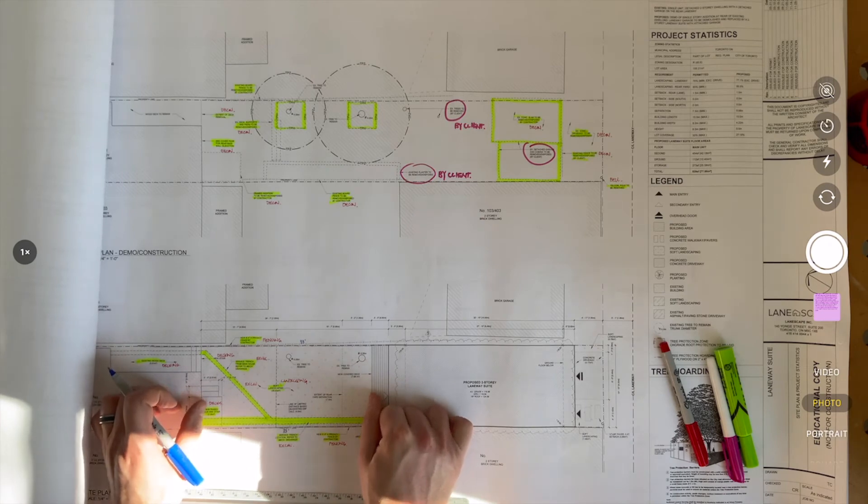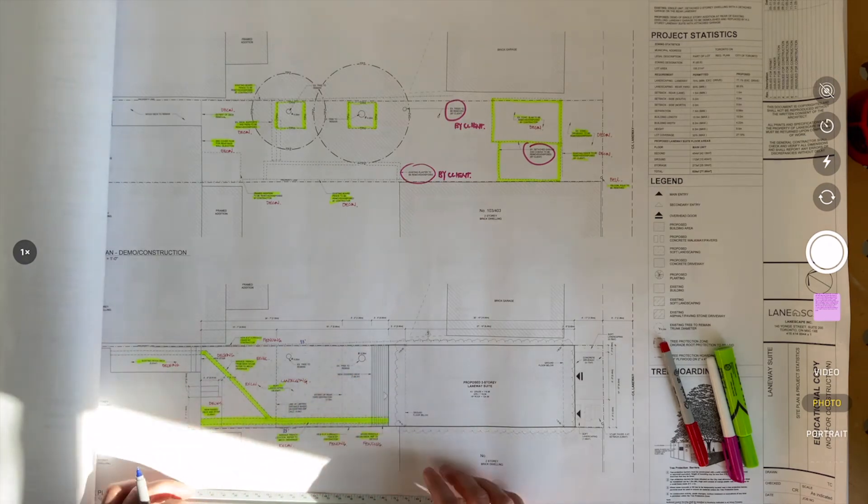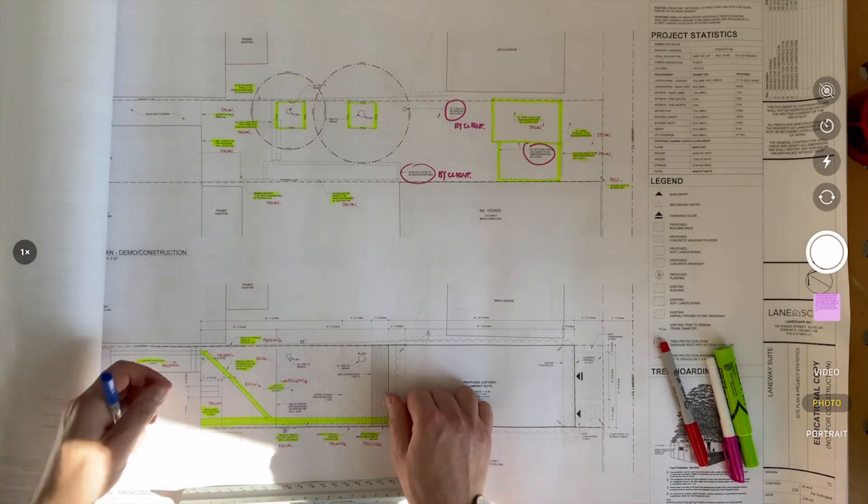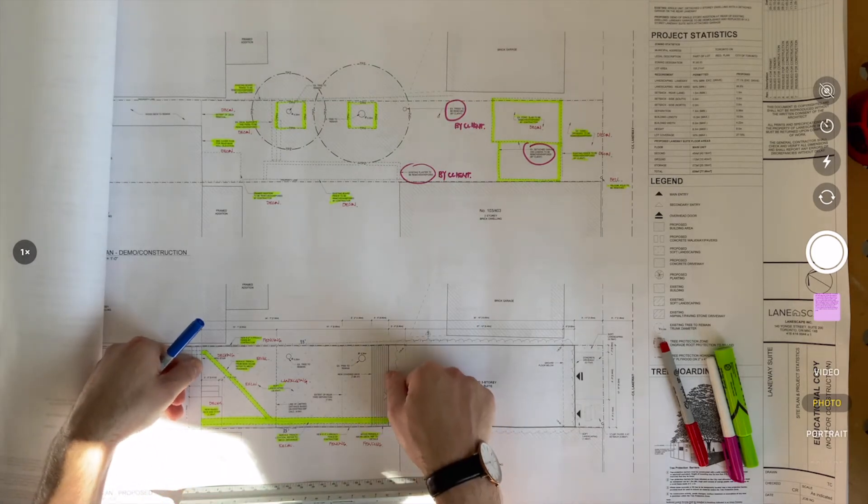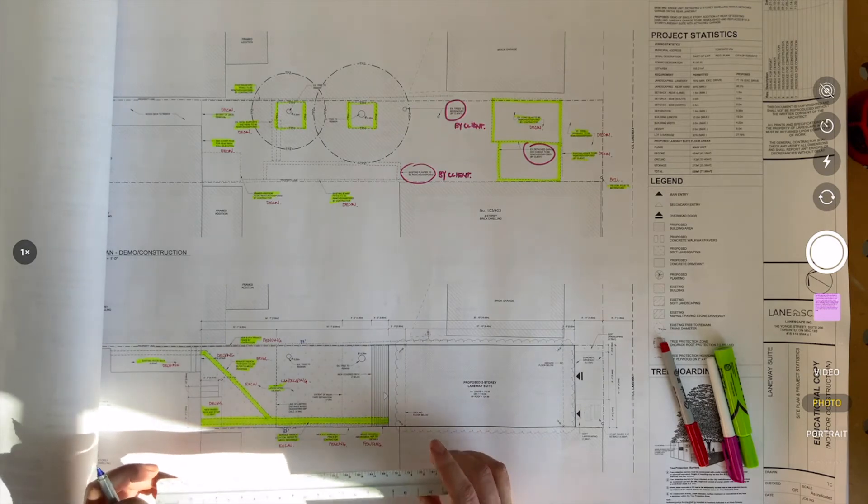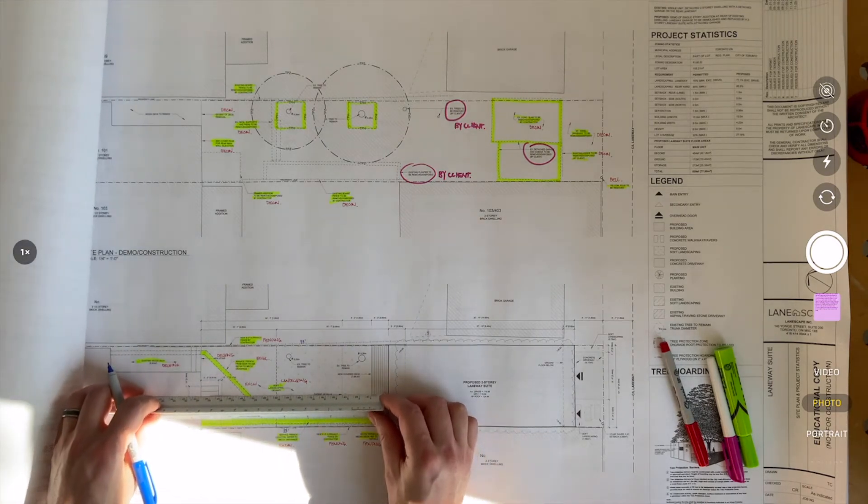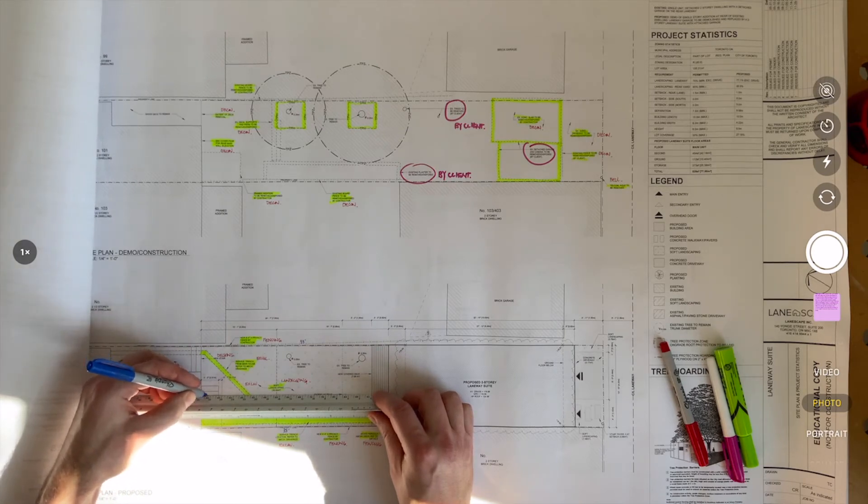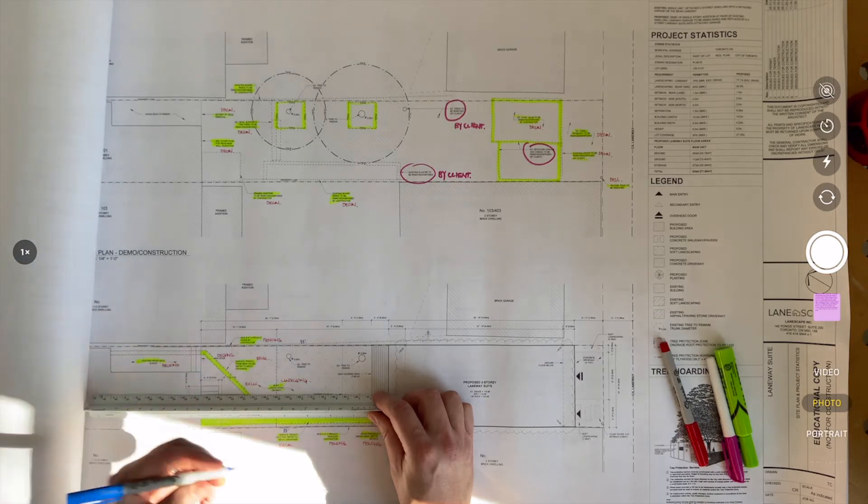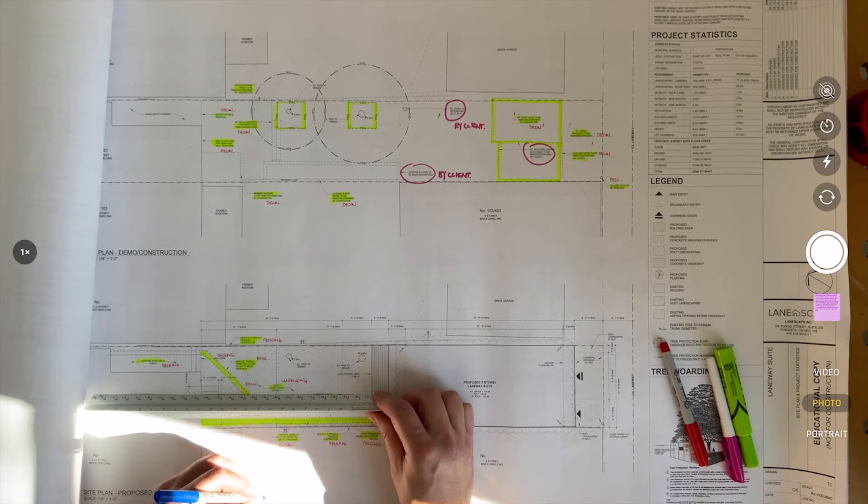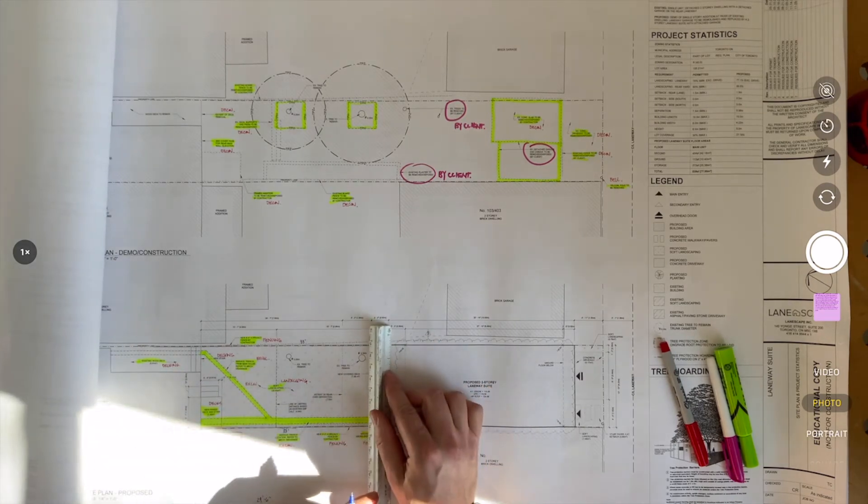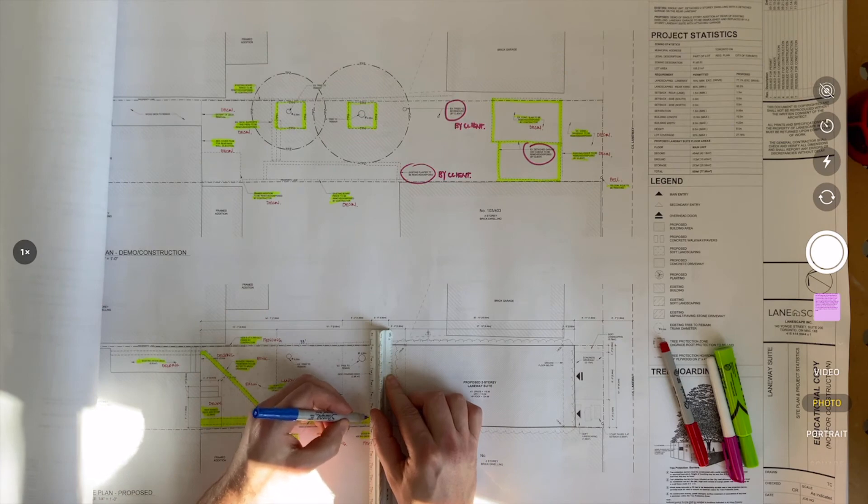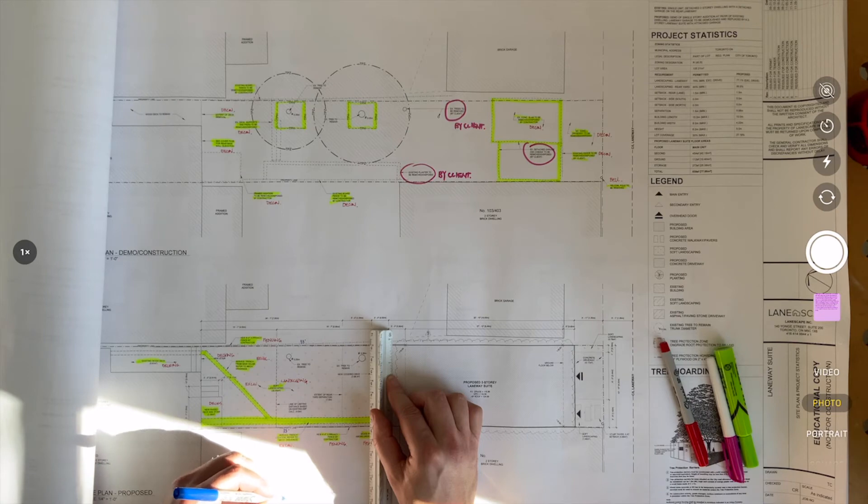Soft landscaping – we buy things like sod, and prep for that backyard is going to be area. So I want to figure out what does my new grass need from here until the edge of this new covered deck? So again, grab my scale, still quarter inch equals a foot, put my zero mark, and I'm going to get that looks like 28, 29, looks like 29 and a half. So I'm making a note here – I've got 29 foot 6. And my width is going to be zero to 12, 13, 13 foot 9. So 13 foot 9 is my area.